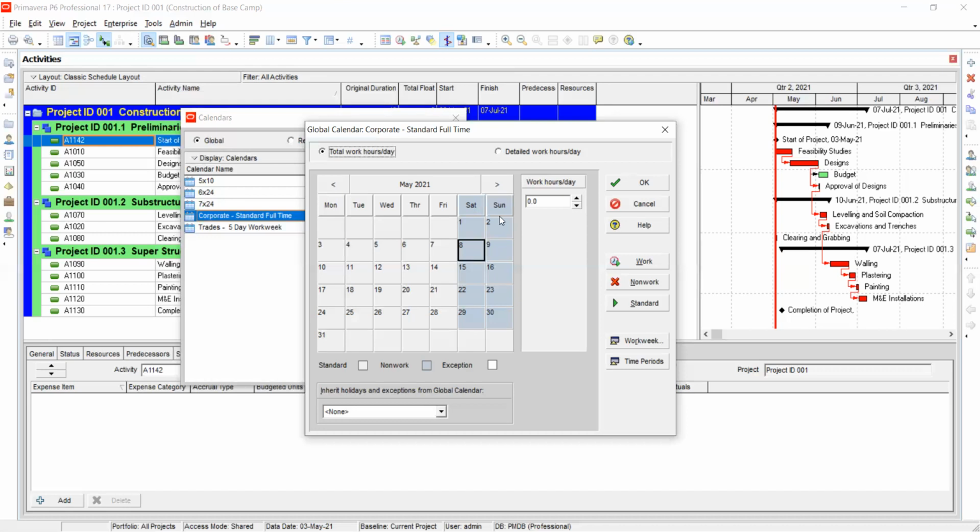Oh, okay. For that case, that cost is supposed to go to resources, because it's what we're going to cover in the next session, tomorrow's session. When you have resources, like a grader, you're going to assign how much it costs you per hour. Then when you go to an activity and you assign that particular resource, if the activity has 10 days, it will calculate the number of hours and redistribute it all over.